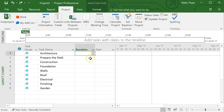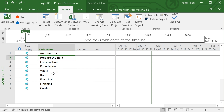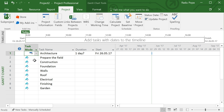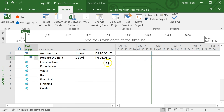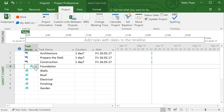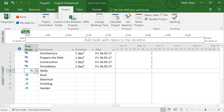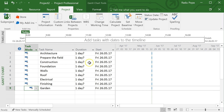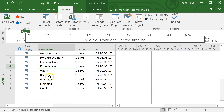Project has two ways of scheduling a task: it can be manual, where you say it'll start now and take a fixed number of days, or it can be automatic. If we make it automatic, it will adapt dynamically to new conditions — because for your project you probably start with an initial plan but things change along the way. This is why I like to have tasks automatically scheduled. You can see it automatically schedules them for today, since today is the project start.